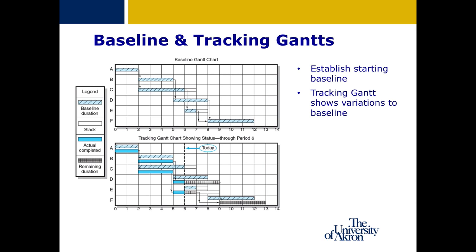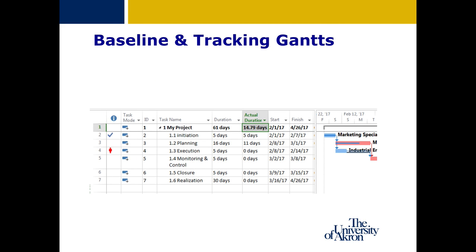Chapter 13 shows how a Gantt chart is typically used to display planned versus actual results. The chart on top shows the planned timeline for the project tasks. The bottom Gantt shows actual completed against the baseline. Based on the actuals, you can see the remaining durations. The estimate to completion is calculated based on the actuals collected to date — in the example shown, through period 6 of the project. This is something we'll talk about next week in the lab.